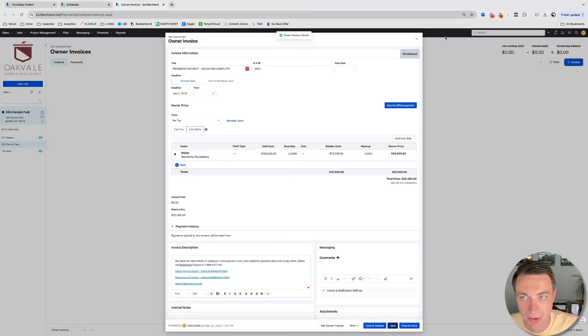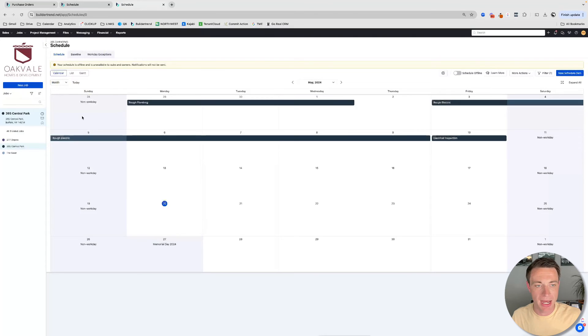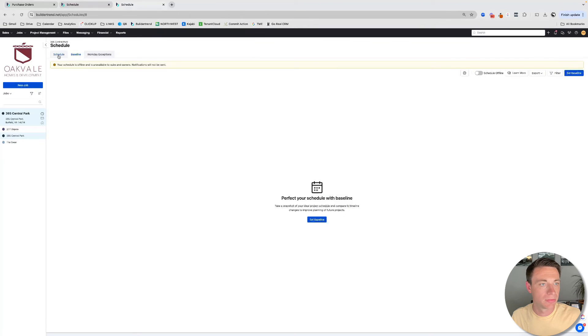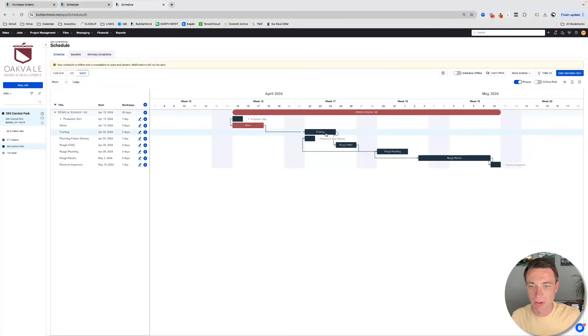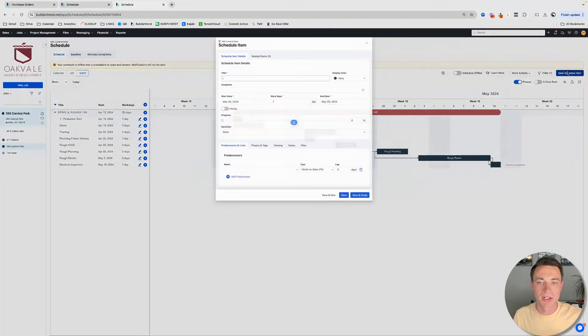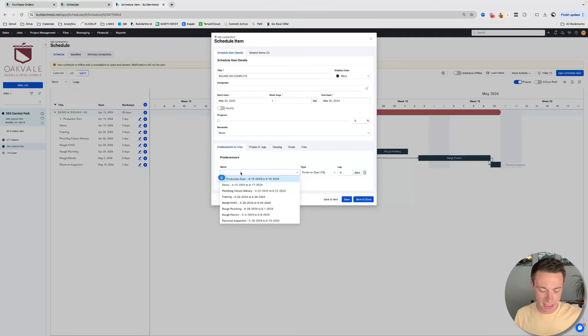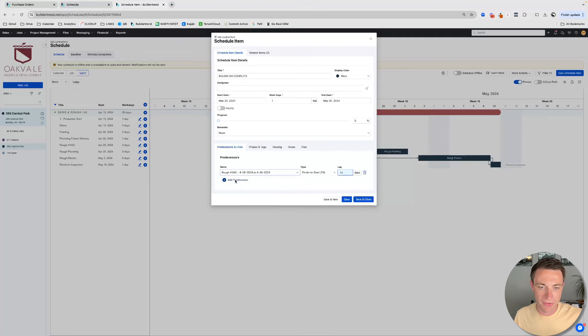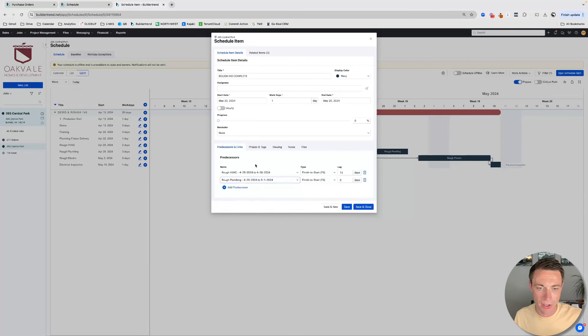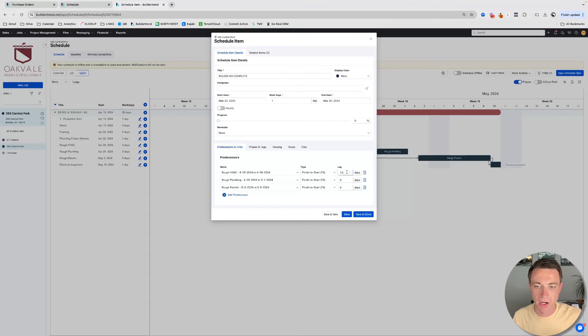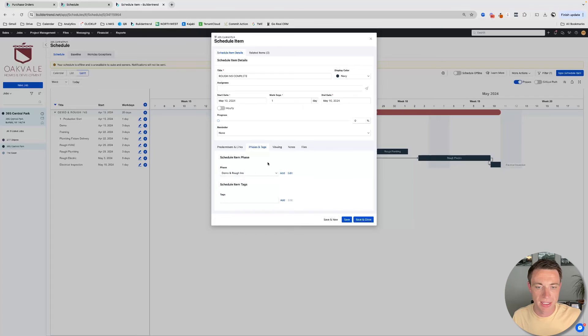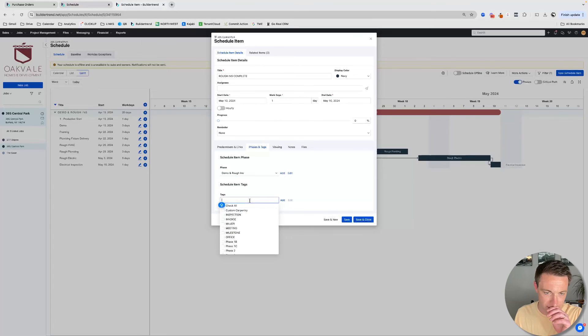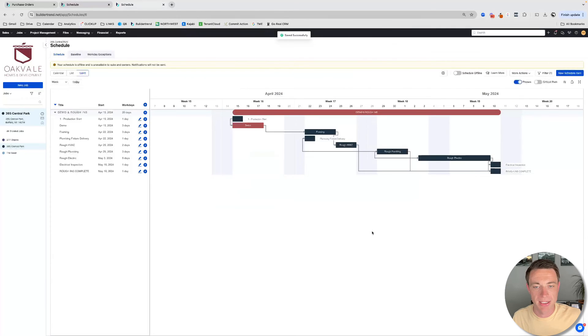Now what I like to do with something like this, rough-ins complete, is you can base it off of one schedule item. So a good idea would be on your schedule, you can have, or you can do, we have HVAC, plumbing, electrical. We have electrical inspection. You can create one schedule item that is like rough-ins complete. And you can make it dependent on those three. Now, you can only have three dependencies. So got to see if that will work for you. But you could also do it like on maybe drywall starting. Because like drywall obviously wouldn't start unless the other would, right? So the phasing, I can just put it as demo and rough-ins. And then I'd probably do a tag. I'd probably do something like invoice. I'll show you how I use that in a little bit. So I'll just do that. Save and close.